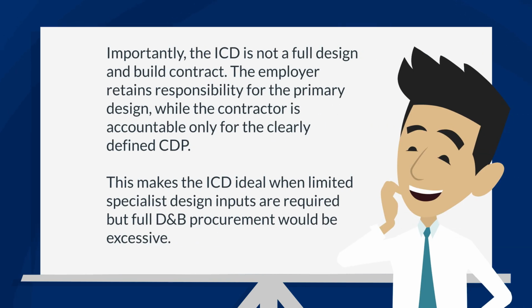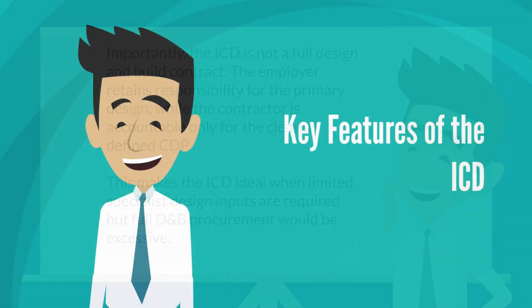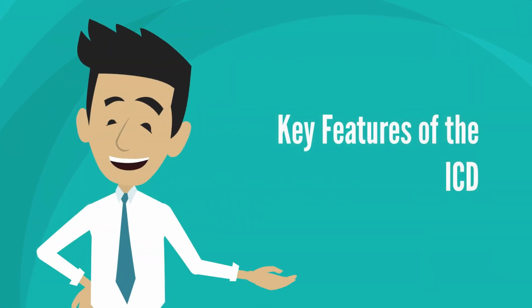Importantly, the ICD is not a full design and build contract. The employer retains responsibility for the primary design, while the contractor is accountable only for the clearly defined CDP. This makes the ICD ideal when limited specialist design inputs are required, but full design and build procurement would be excessive. So let's look at the key features of the ICD.